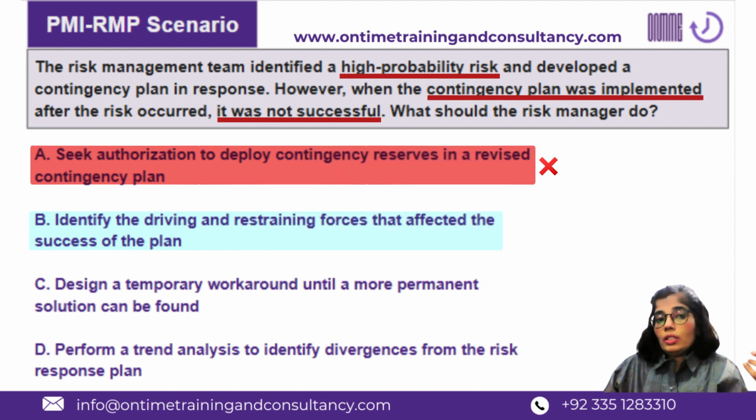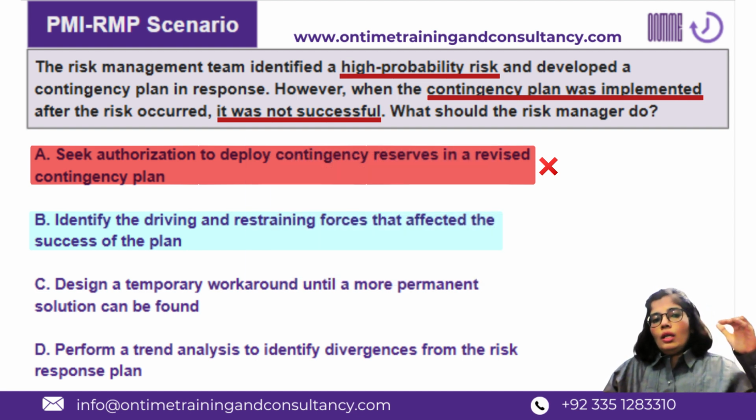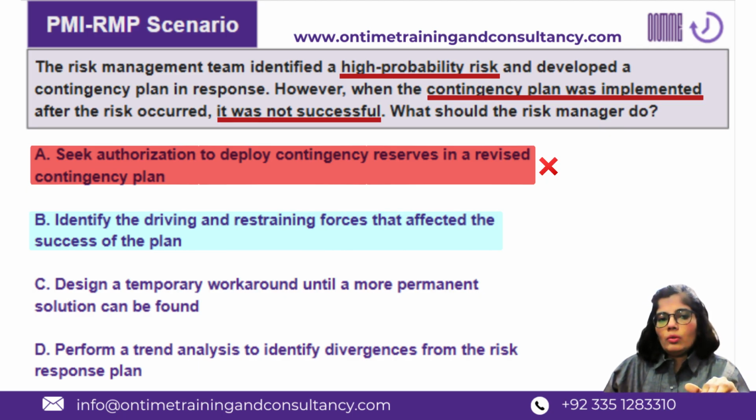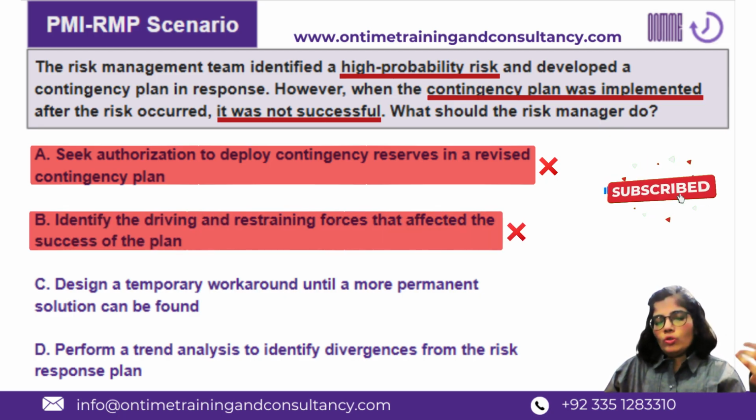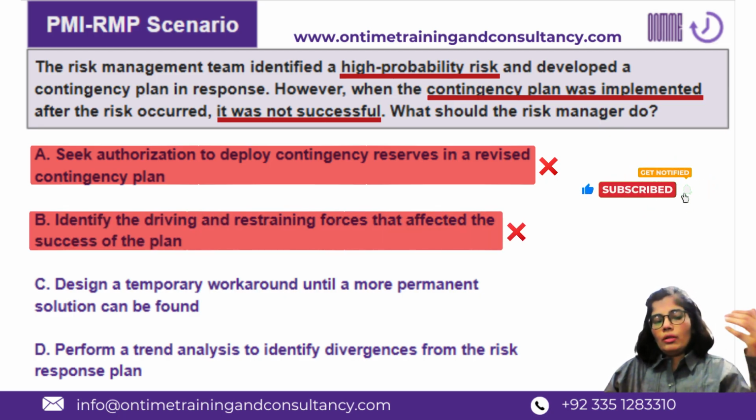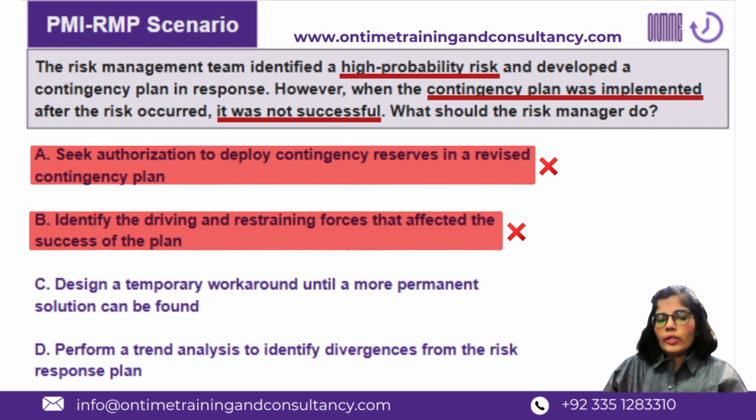But again, it depends on the situation, whether the situation demands a quick workaround or fixation, or the situation demands that you do a retrospect of that risk. In this situation, of course, the retrospect is not the first thing to do. Of course, you are going to do retrospect during the risk monitoring exercise and during the risk audit exercise.